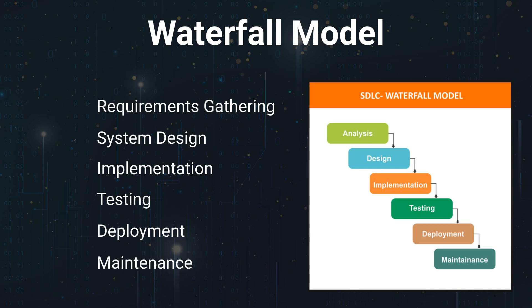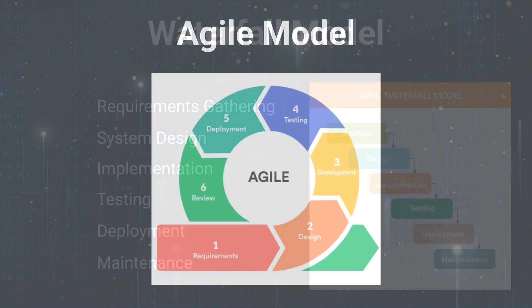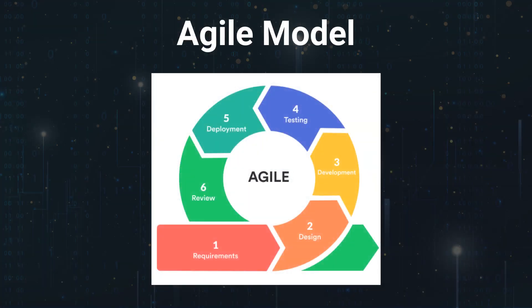Overall, the waterfall model is best suited for projects with well-understood and stable requirements, such as simple software applications with minimal anticipated changes. However, in dynamic and rapidly evolving environments where requirements are likely to change or are not fully understood initially, more flexible and adaptive approaches like Agile are often preferred. The Agile model is an iterative and flexible approach to software development that prioritizes collaboration, customer feedback, and adaptability. It emphasizes breaking the development process into smaller, manageable cycles called sprints or iterations, which typically last a few weeks. Agile stands in contrast to traditional linear models like waterfall — instead of detailed upfront planning, Agile allows for evolving project requirements and continuous improvement.